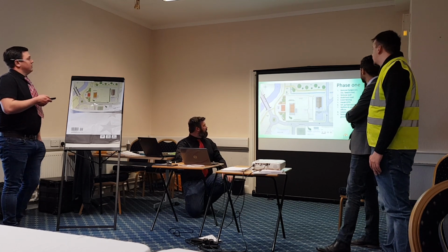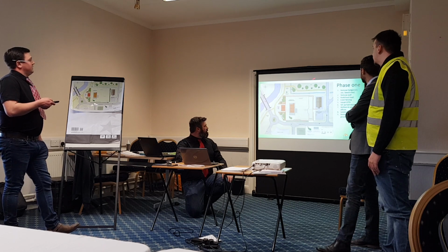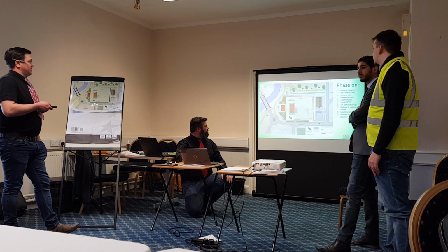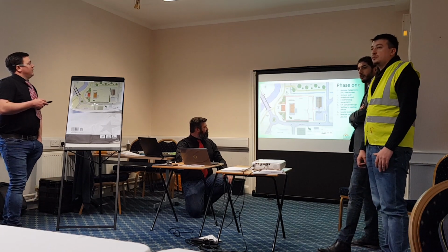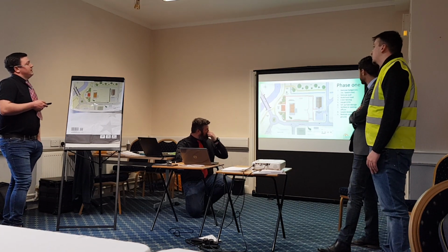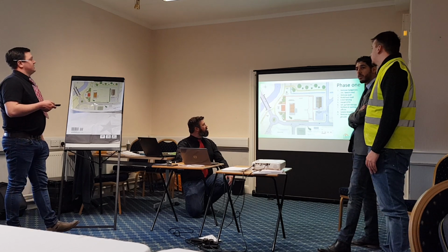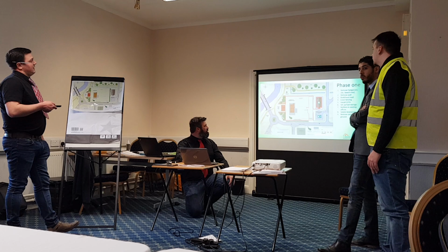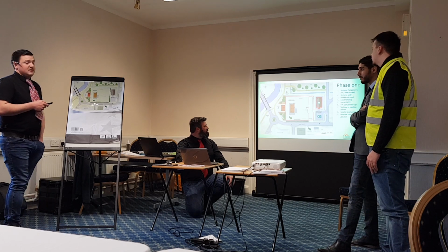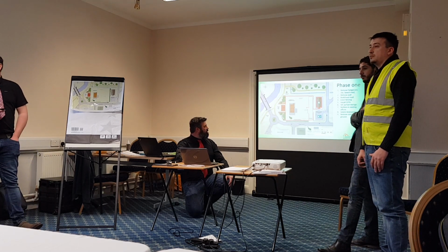We're going to erect hoarding all around the site to keep site nice and secure away from pedestrians and anyone else who tries to access. We're going to install CCTV on the hoarding. We're going to set up a fuel storage just here through the haul road. There's going to be a gate here with a manned security guard who's going to take all the information off delivery drivers.